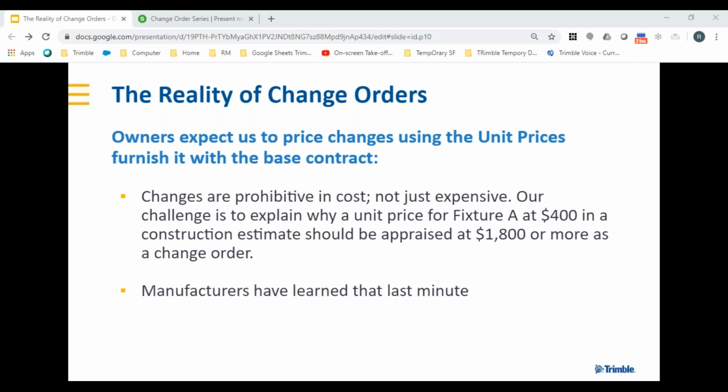I ask for an add at the beginning where I can plan it into the material purchasing, I can plan it into the progression of work. My labor goes up and they carry this additional material with them, but they're doing the same installations, the rough-in, the wire pulling, whatever they might be doing at that stage. That is a much different value than if I make that alteration at 70% completion of the project, where I'm going back over, worrying about services, simply carrying material from one place.